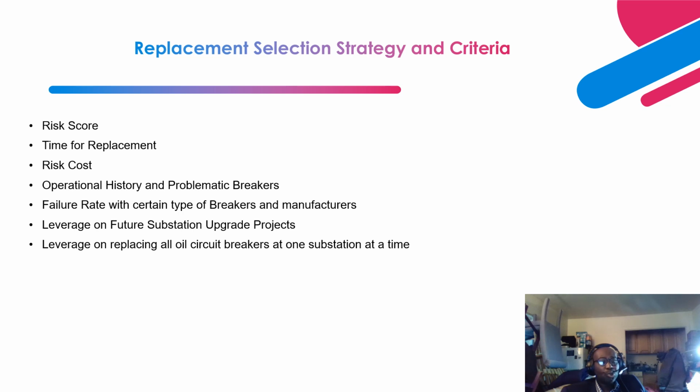Okay. So you scratch it off and create a different list, because sometimes even substation upgrades can be cancelled, due to unavailability of funds. So there has to be that collaboration between you and these project managers from project management, with constant communication to find out whether the substation upgrade is in line, or it has been postponed, or it has been cancelled.